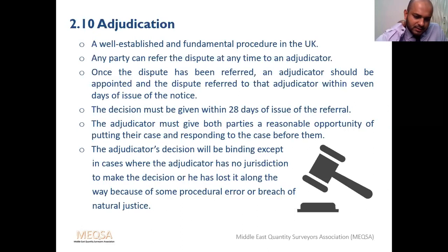Adjudication is simply said like this: pay first, argue later. Adjudication will give a temporary solution to the process. It is not a final solution if the party is not bound. It is a temporary solution to resolve the issue temporarily. At the end of the project, if parties do not agree with the adjudication decision, they can go to the court. So this is a midway solution. If parties agree, there is no issue. If the parties do not agree, they can go to the court. And the adjudicator will come to the site and it's an in-house solution. So within the site, the problem will be solved.